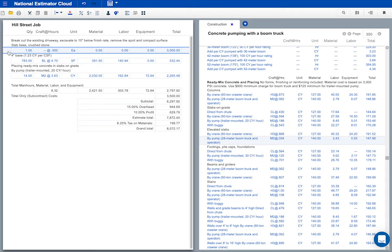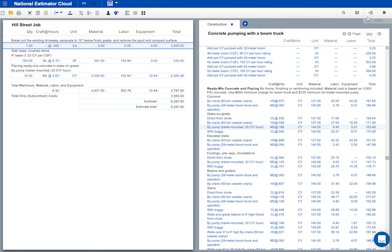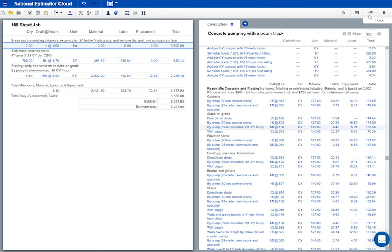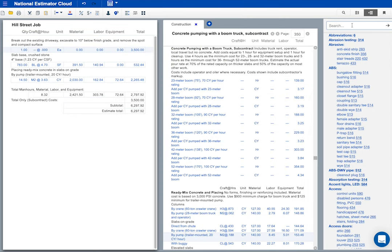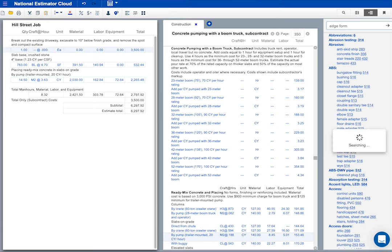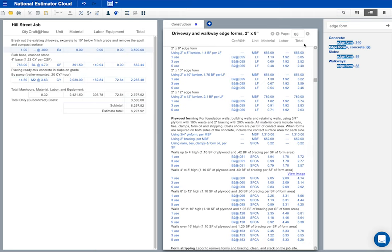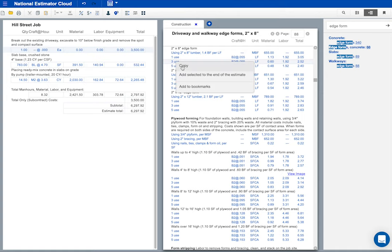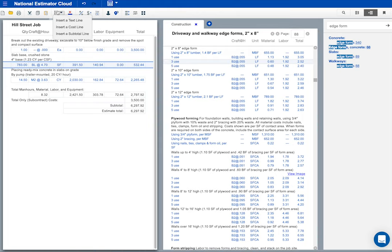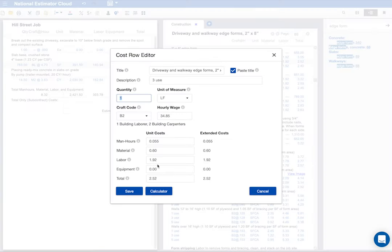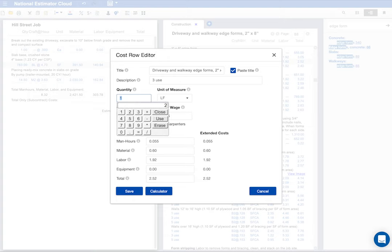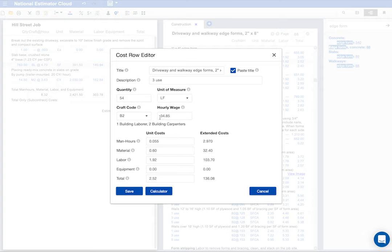I haven't figured the edge forms yet. We'll have to set 27 feet of 2x8 edge form on each side of the slab. So I'll open the index and find some edge forms. This is what I want. I'll right click and select copy. Now I'll click in the estimate where I want these costs pasted. Now I have to figure the cost. Each side of this driveway needs 27 linear feet of form. That's right, 54 linear feet of 2x8 form. I'll press tab and check the cost. This is about right. So I'll click save.